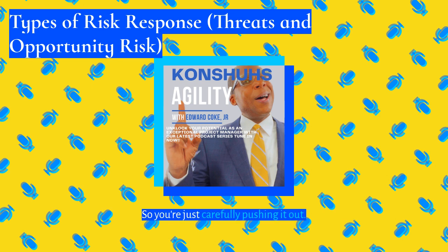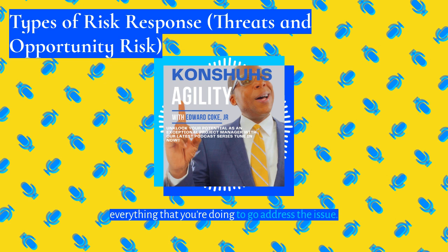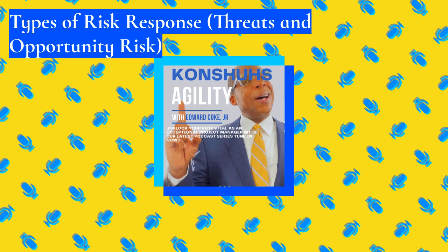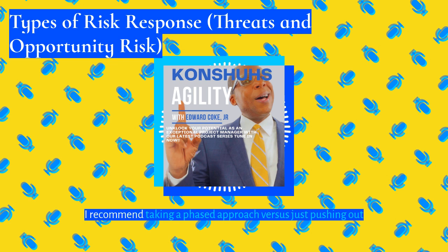So you're just carefully pushing it out. And if you're getting feedback from the client during this phased approach, you have a better chance of finding out what the issue is, stopping everything you're doing to address it, and then continuing on. On big projects, especially multi-million-dollar projects, I'd recommend taking a phased approach versus pushing out everything at once.